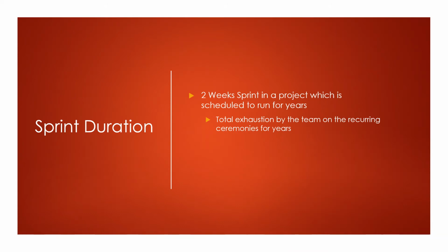Now we will talk about the sprint duration. Consider this: in a large project which is going to be executed for many years, a 2-week sprint is going to take a toll on developers' enthusiasm. The repeating ceremonies every 2 weeks, including the necessity for the client demo at the end of the sprint, will make the developers bored, and hence they might skip some important ceremonies and become less productive. There is no hard rule that sprints must be 2 weeks. I would recommend a 3-week or 4-week sprint in a large project, which will excite the developers to be more productive.